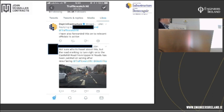of carriageway for resurfacing. So on this particular weekend, we were in on the Saturday night on Upper Newtownards Road. We planned out just north of 1,000 tonnes, preparing ready for the surfacing squad coming in on the Sunday morning at 6 o'clock. I think there was approximately 600 tonnes of hot rolled asphalt laid on the Sunday. This is just at the end of the section, and that's all the plant and all the logistics and all the transport that goes along with that. No issues with rolling straight edge test or texture depth test.